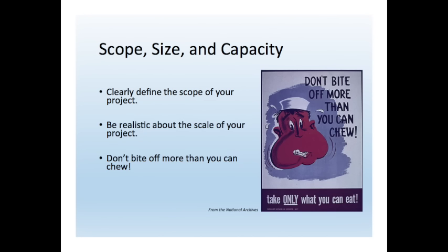Your partners or scanning center may have other customers or projects they're also working on, so you need to put your project in the larger context of other priorities, which could affect the size and timing. Another piece to keep in mind is staffing. Is this all going to be on your plate? Are multiple people going to be involved, with different people responsible for different parts? If there are multiple people involved, that brings up issues of workflow and how materials and responsibilities are transferred from one step to the next.